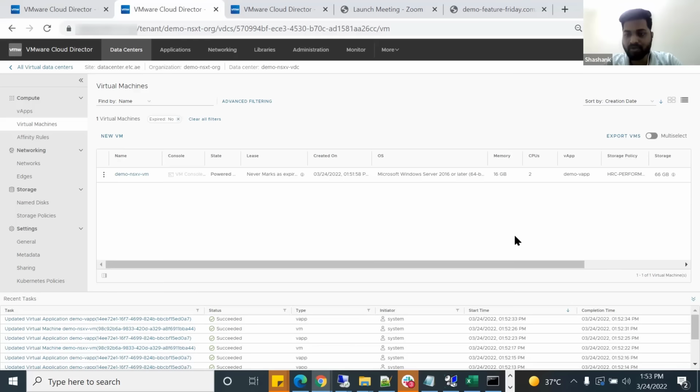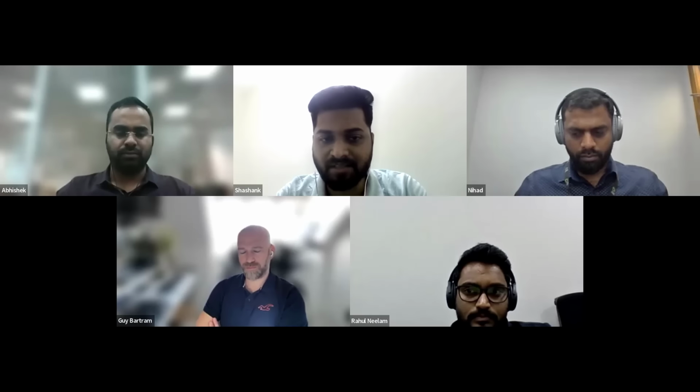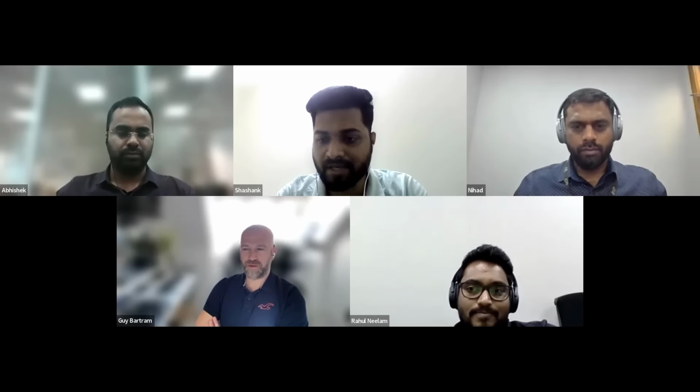So before we do a migration, we will check what services are running in it. Once we are done with the failover, we'll do a check at the service level, or we will run a netstat command to check if those services are listening or not. If there is any issue, we will troubleshoot accordingly. If any service needs to be started manually, we will do it. If we are not managing the application, we will involve the customer to check their application before we do any changes at the core network level.